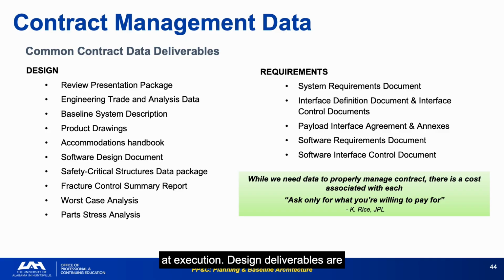Design deliverables are both schedule milestones and technical products. Drawing release rate, ICD completion status, and review presentation packages should all appear in the IMS as measurable activities with specific completion criteria. When a contractor is struggling with cost or schedule, one of the first places you'll see it is in the quality and timeliness of design deliverables. Superficial drawings, late deliveries, and incomplete documentation are leading indicators of deeper execution problems.